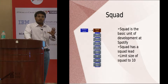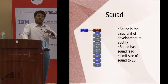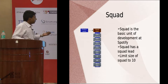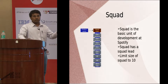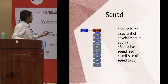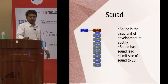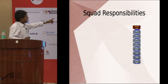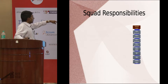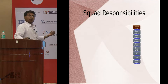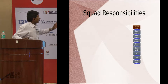In the Spotify model, they've gone back to agile principles and call the team a squad. A squad is like a scrum team — it could be Kanban or any other model — but they call it a squad. The squad has a squad lead as well as a product owner who gives ideas to the squad. The size of the squad is limited to 10, and this is the basic unit of development at Spotify. The squad includes a squad lead, dev backend, dev web, quality engineer, PM, and tech ops — a fully functional team responsible for an entire feature.